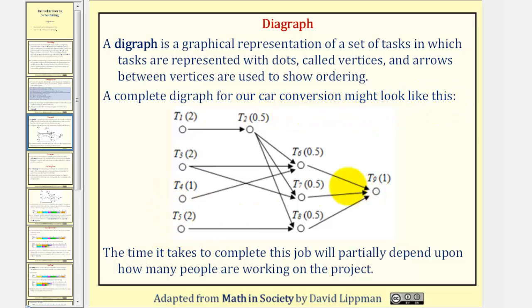Notice how there are nine tasks, T sub one through T sub nine. If we look at task one just for a moment, notice how task two, as well as tasks six, seven, eight, and nine cannot be completed until first task one is completed. The time it takes to complete this job will partially depend upon how many people are working on the project.